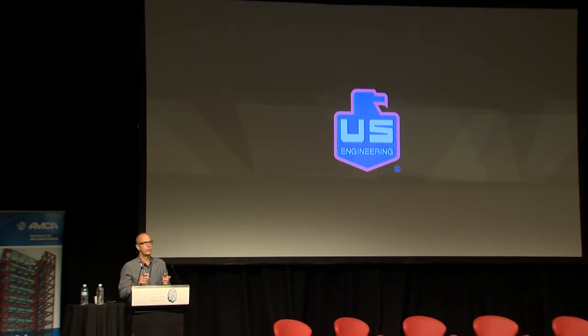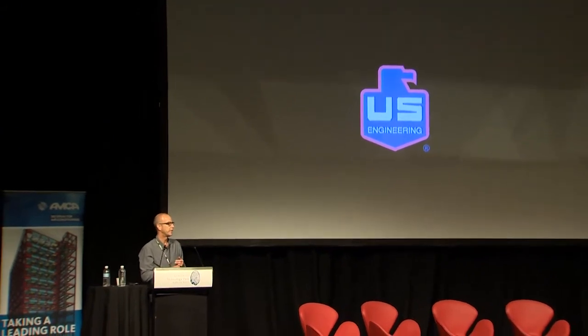A lot of lessons learned from that project. It was the first one that we did. It's become standard on every hospital project that we modularize things. And they're multi-trade assemblies. They're done in a warehouse, usually near the project site. That technology is rapidly advancing into all forms of projects. So we have a project going right now that's a high-rise hotel. They were talking about modularizing the entire front half of the hotel room. So the bathrooms and the fan coils that are above the ceiling, all of the mechanical components would be contained within that module. And that technology is spreading out.